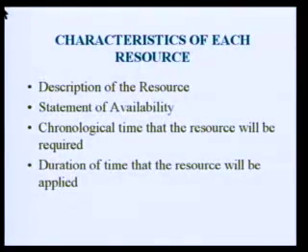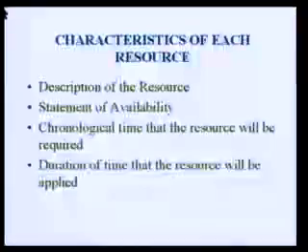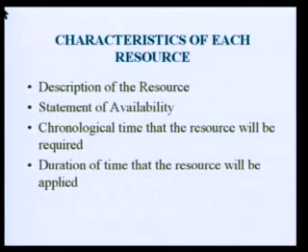So the next point is, what are the characteristics of each resource? Please have a look at the slide. For each resource, there are some characteristics. They are description of the resource, statement of availability, chronological time that the resource will be required, and duration of time that the resource will be applied. All these 4 points are the characteristics of each resource. So let us start with the first one, description of the resource. Let us start with human resources.